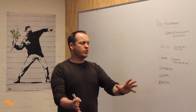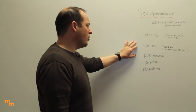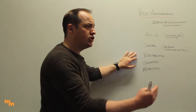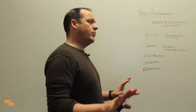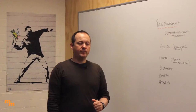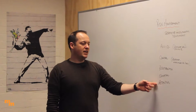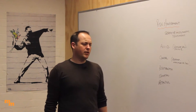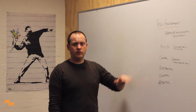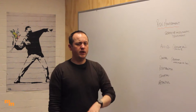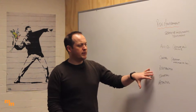Once you've gone through the process and looked at all the risks, you work through: can I avoid it and get rid of the risk? No, we're still doing the activity. Can I control it and reduce the likelihood or consequence as low as I can? Is there anything I can insure, move, or get someone else to deal with? Can I isolate things, separate people mechanically or otherwise? Whatever's left is mine. I still need to ask: is that an acceptable risk? Have I got it as low as I could? If not, I might still go back and choose to avoid. Think carefully, plan accordingly.